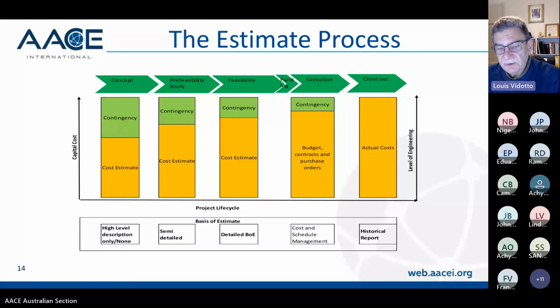Get involved in the build up of the bids for contracts and procurements to align one with your cost code, with your work breakdown structure, your commodity codes, and back to your budget items.